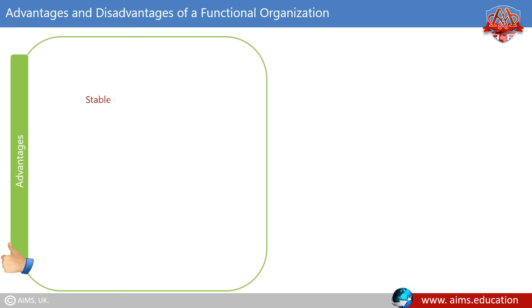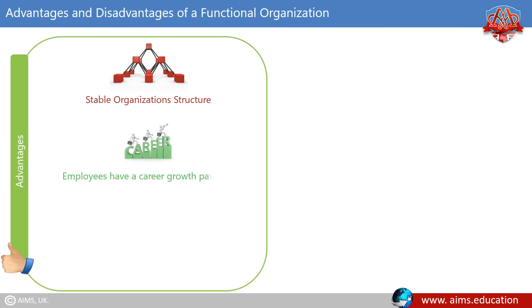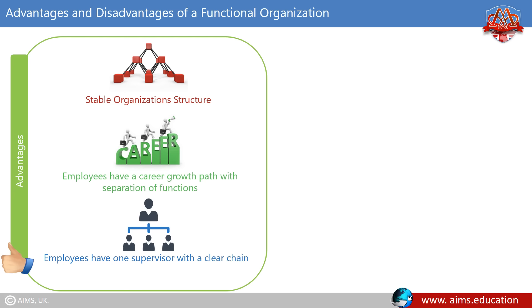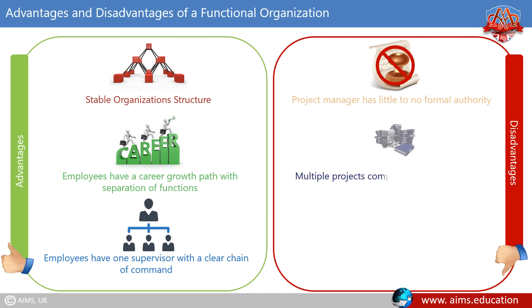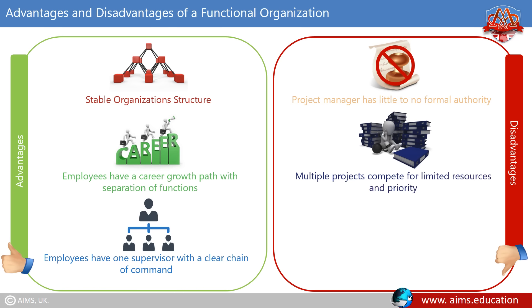The advantages of a functional organization are as follows: it is a stable organization structure; employees have a career growth path with separation of functions; and employees have one supervisor with a clear chain of command. Disadvantages include: the project manager has little to no formal authority; multiple projects compete for limited resources and priority; and project team members are likely to remain loyal to their functional manager.